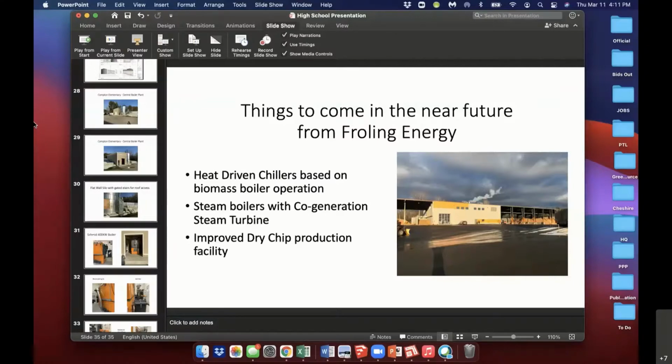Energy performance contract, and we don't always know what the terms are, but generally the goal is to have the energy savings pay for a 15-year note, so that if they're not spending any additional money per year, they've been successful. It doesn't point directly to the energy cost savings, but sort of an indirect loop there, whereas somebody that just buys the boiler outright has a more direct means of understanding what that ROI is.